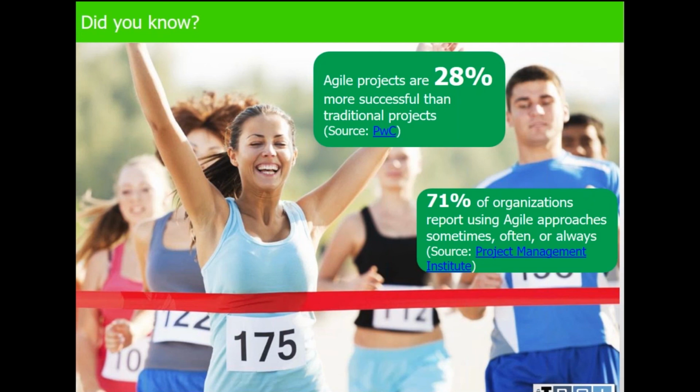Agile, on the other hand, because there are short iterations and the customer has early opportunities to see the work being delivered and make decisions on changes throughout the project, allows change to be very flexible and not quite as expensive. But with this being said, because waterfall is more rigid or structured, it is easier to track and easier to control the cost, which could not be said about agile. This is what really leads most clients to want to do a mixed approach, meaning they want the flexibility of agile with the tracking of waterfall.